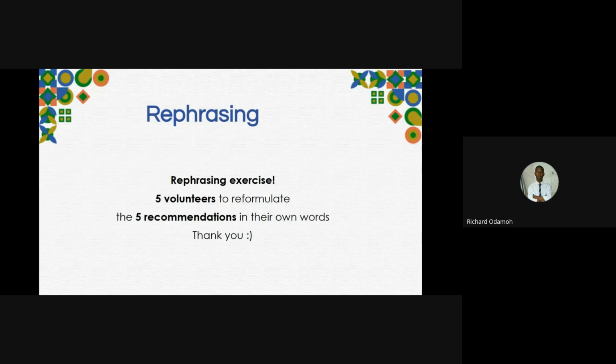So we wanted to help, and one of the ways that we decided to help is to create a robust primary care network. We decided to begin by going on a site visit to gather insights which can be used to develop our data collection tools and even objectives for the project. After we did this, since the county government is one of the main stakeholders that deals with regional healthcare, we decided to onboard them for co-constructing the project and project design.